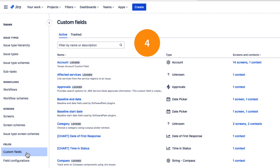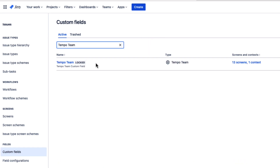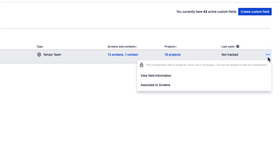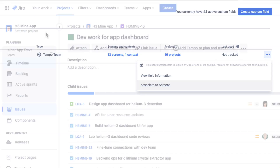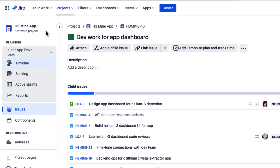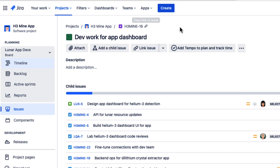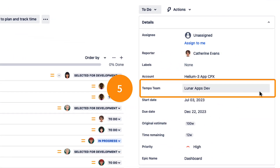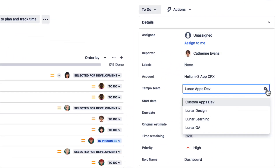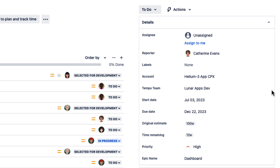Step 4: Make sure that your Jira admin adds the Tempo Team custom field to the issue screens for your Jira projects. Then you can link your teams to those issues. Step 5: For each epic in your Jira project, select the correct team in the Tempo Team field. Note that only one team can be assigned at a time.